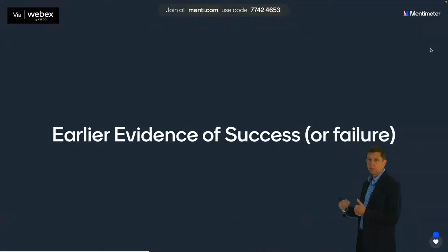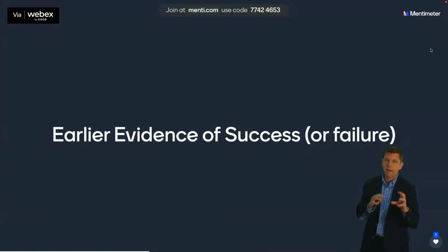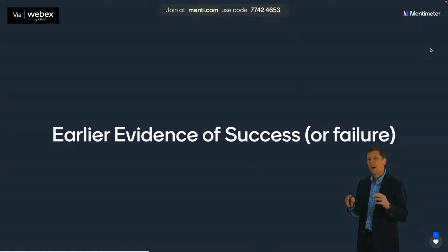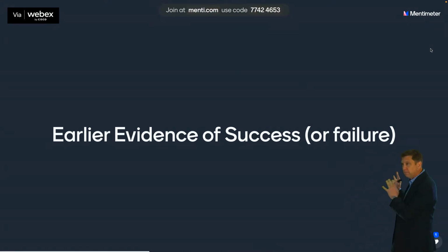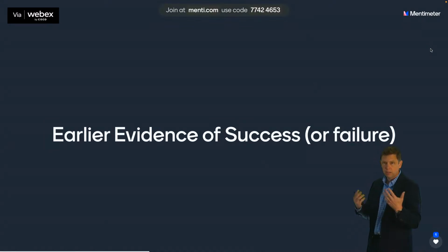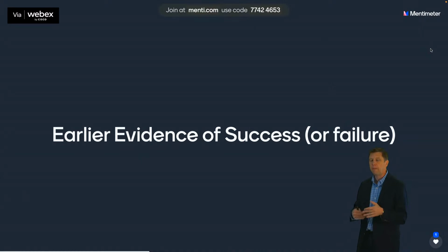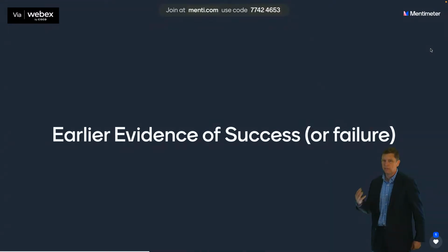Well, if you've got that and the customer is expecting that this whole project is going to take a year, and for some reason the developers have trouble delivering that in 9 months, or 6 months, or even 3 months, and there's a whole bunch of other work, you've now got some pretty good evidence that this isn't going to actually meet the needs of the business. On the other hand, if they're able to deliver that in a reasonable period of time, the business can look at that and say, hey, this looks good. We have succeeded at this piece of it. I now have some trust that the next piece of it, we can do the same thing again, and maybe even do better now that we've learned some things together.